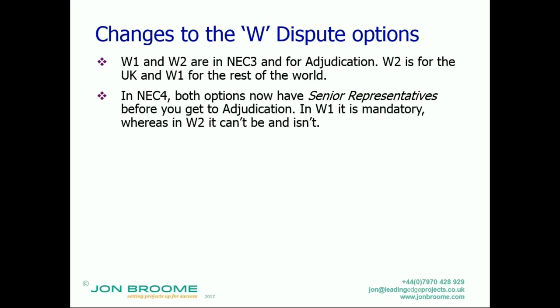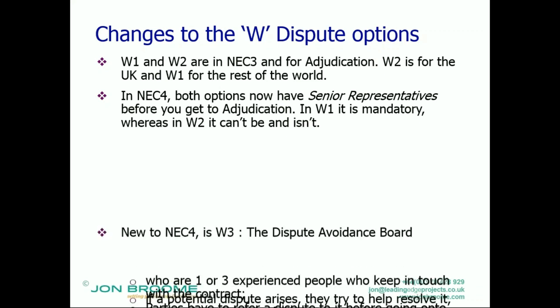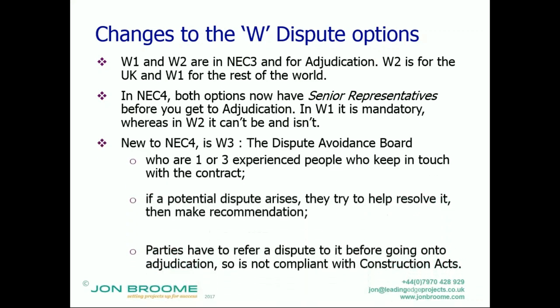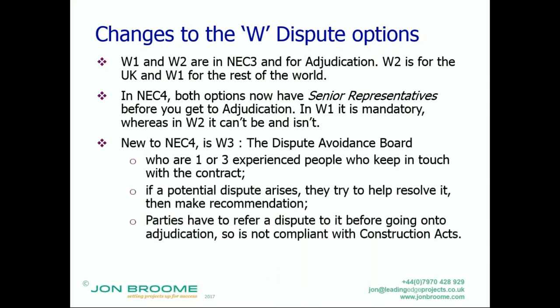In W1, it is mandatory, but in W2, it can't be because it's subject to the UK Construction Act, and it isn't. Okay, so it's optional under W2. They have also added in, new to NEC4, is W3, which is a dispute avoidance board.